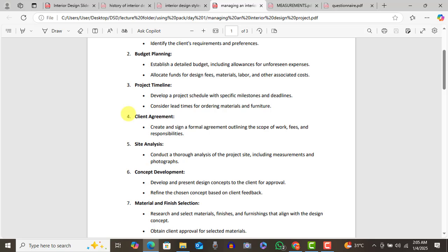On the construction side, we have something called instruction. So everything that the client tells you must be written. It must be documented. Otherwise, it can easily be disputed. So you always have some form of documentation. Every instruction must be something you follow. So if they are giving you some instruction on the phone, kindly WhatsApp it to me. Something we can always refer to.